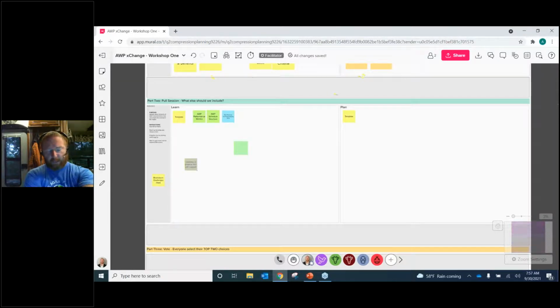Yeah, excellent, Luigi. Yes, definitely a very real issue. Speaking specifically with my O3 t-shirt on, O3 has a data specification that we provide to our clients. What that does is it tells people, especially the engineering contractor, right up front, in order to make the system work, here's the information that we need. We can walk them through the information requirements and how it needs to come in. This can look at all of the different data points, anything from engineering information, material information, to how your P6 schedule information needs to come in.